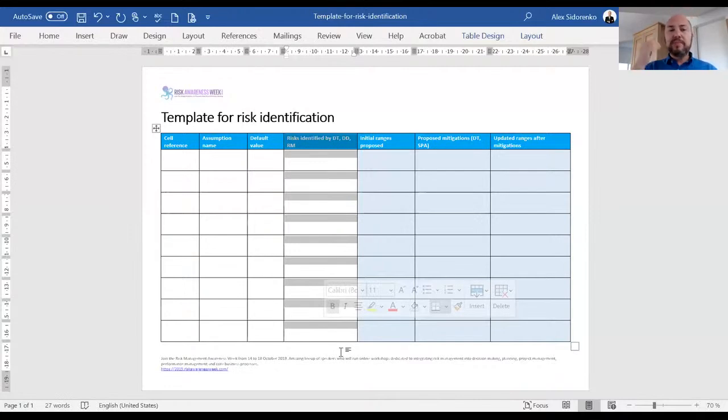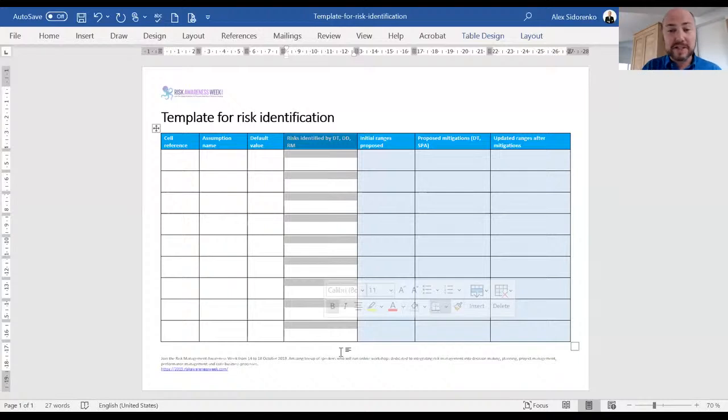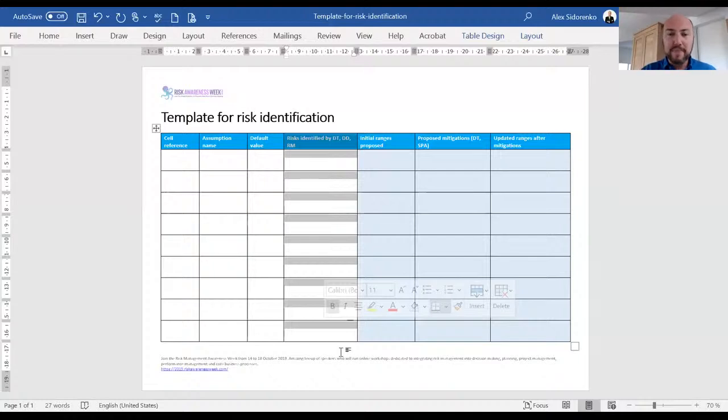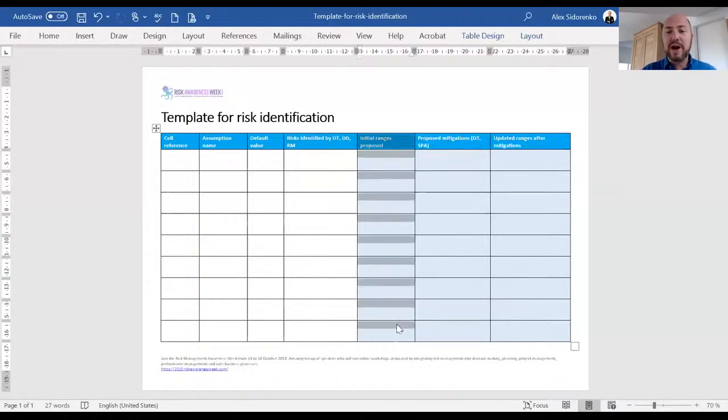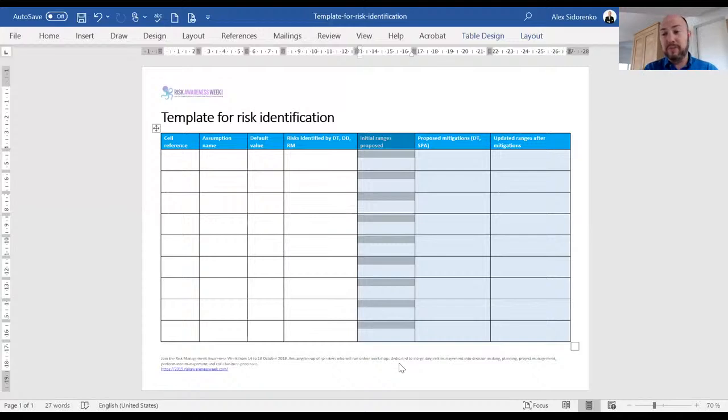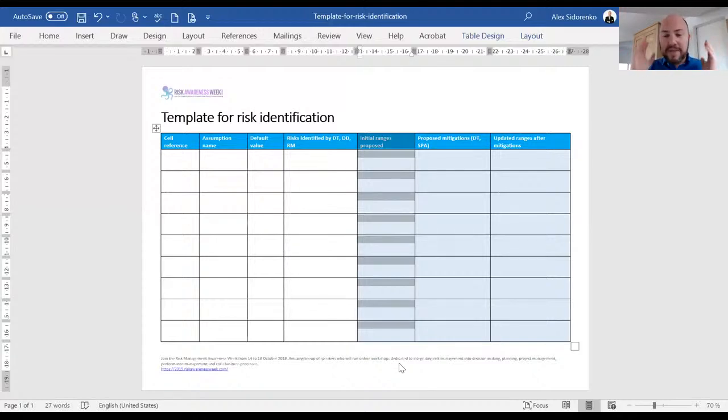The fourth column, that's when we actually identify risks. And depending on how many risks we have identified, depending on how significant those risks are, we now have grounds to start replacing default values, which were usually single point estimates, with ranges. And that's the whole idea of risk analysis.